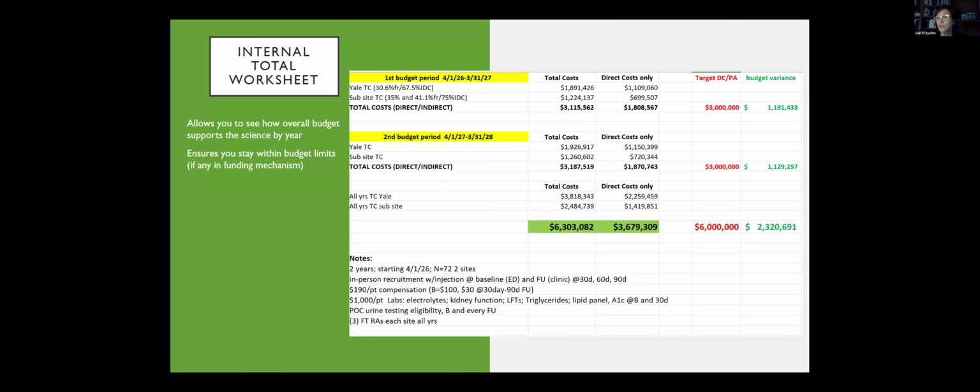Like our IDC rate just changed, and our fringe rate changed. I can't go back and say, I want to fix this. So it's stuck the way it is. And when they fund it, by the way, it's stuck the way it is. Say the PI or the COI, you have it up to the cap, which is whatever it is now, 200 something, and you fund it that way. You're not allowed to say, I think it's going to go up, because no one knows really whether it will or not. And you're funded that same way the whole way through.